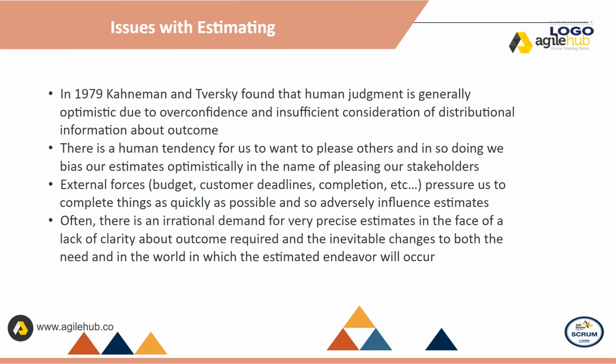There is a human tendency for us to want to please others, and in so doing we bias our estimates optimistically in the name of pleasing our stakeholders. External forces such as budget, customer deadlines, competition, and so on, pressure us to complete things as quickly as possible and so adversely influence estimates. Often, there is an irrational demand for very precise estimates in the face of a lack of clarity about outcome required and the inevitable changes to both the need and in the world in which the estimated endeavor will occur.